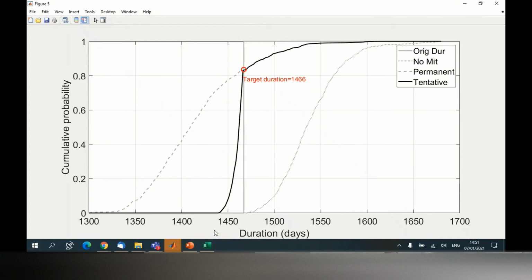And of course, the risks are something that you don't have control over. Because if you already identified 20 risks, then you have to include all 20 risks. Otherwise, you are not really modeling real life, because in real life, risk can occur.